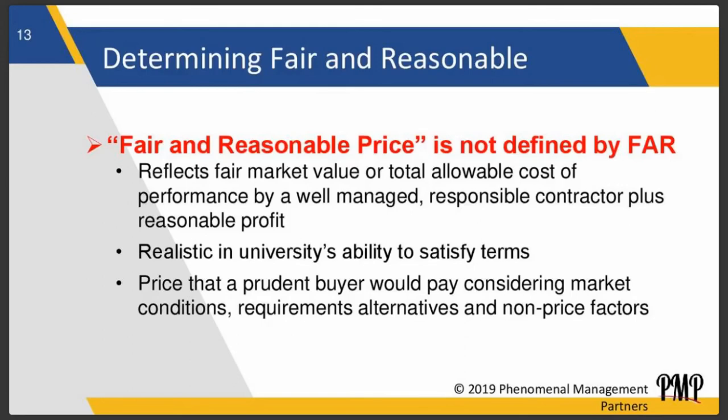And so sometimes the price goes up, the price goes down based on the condition and based on the market area. So you have to understand that when you're proposing on this particular effort, you've got to find out the background of where this effort is going to be. What are the requirements? And okay, if there's a blizzard, maybe I've got to come up with an alternative price, and maybe I need to price in things that are not normally there. So just keep in consideration that when you're looking at the effort and determining a fair and reasonable price, you have to look at the overall effort, and you have to go into your time machine and think about things that could possibly happen.